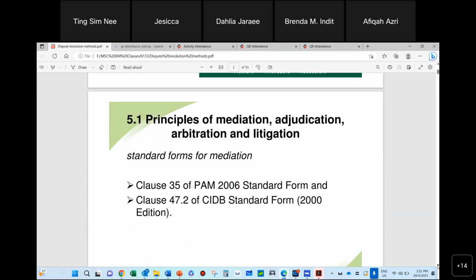So I think mediation is a technique that a lot of professionals are trained in. Not only for construction cases, but for many other types of dispute, like family disputes, commercial disputes, consumer disputes, they will go for mediation first, which means some third party comes in and gets the two parties to talk to one another. This person called the mediator will be very gentle, bring up the points of both sides, see what is going on, and then advise accordingly, but would not force their opinion on you, and you may not need to take their final decision. Okay, so that is mediation.